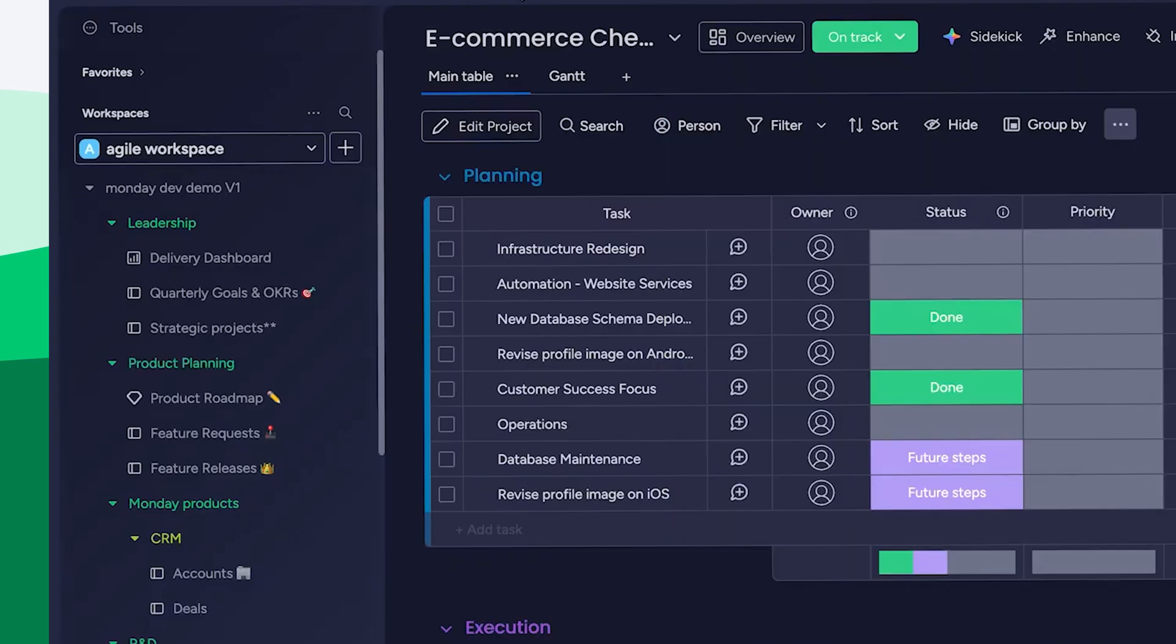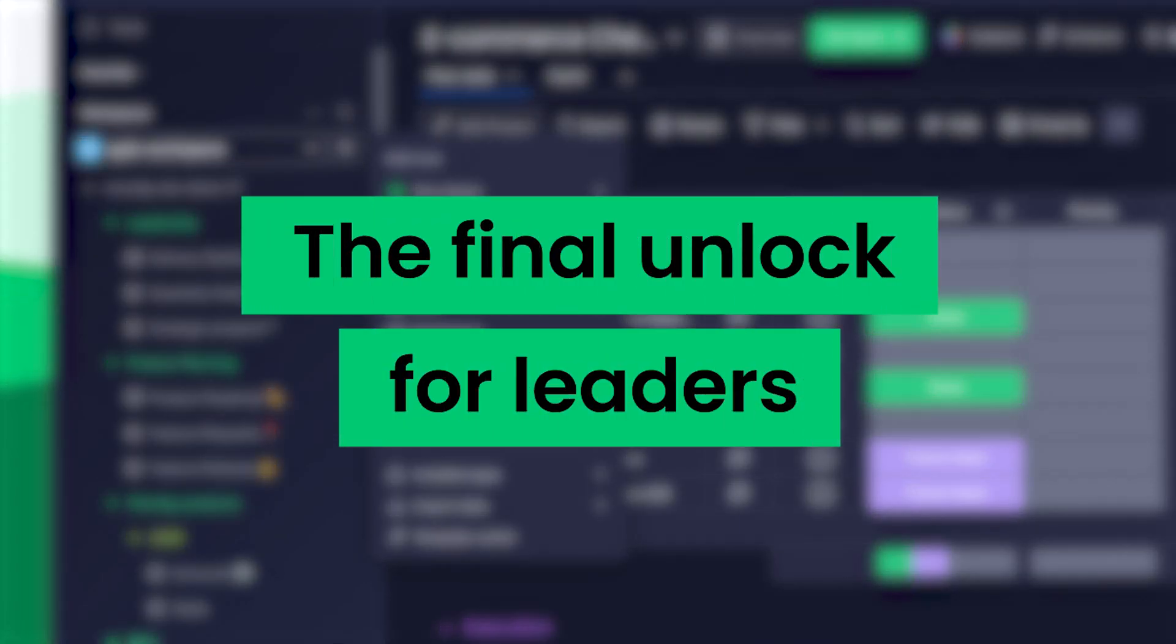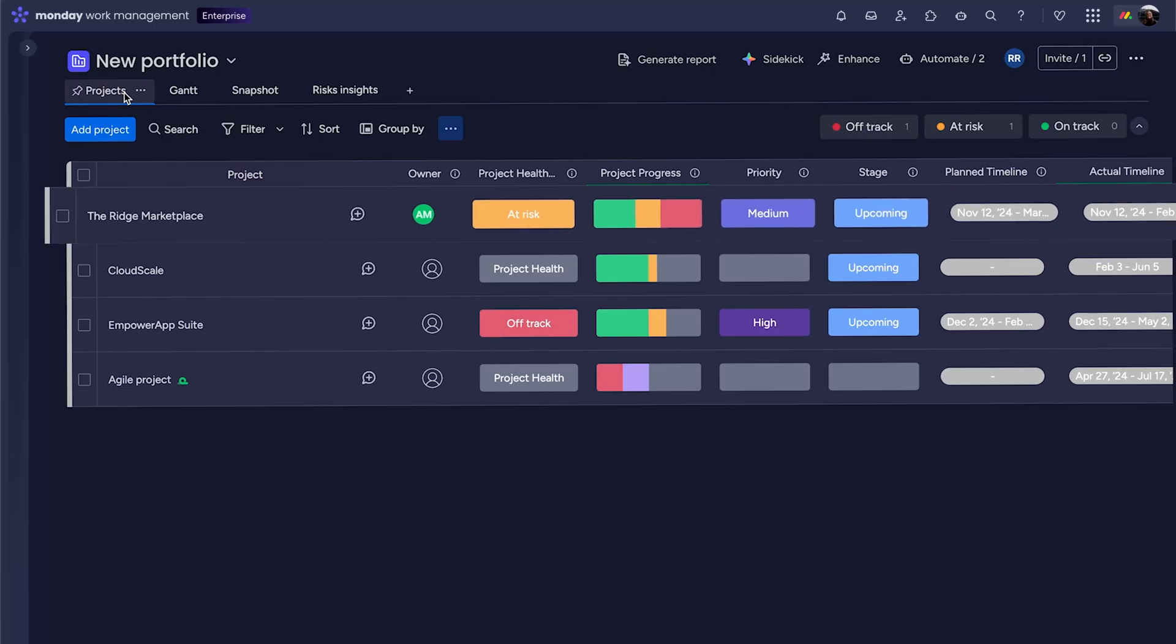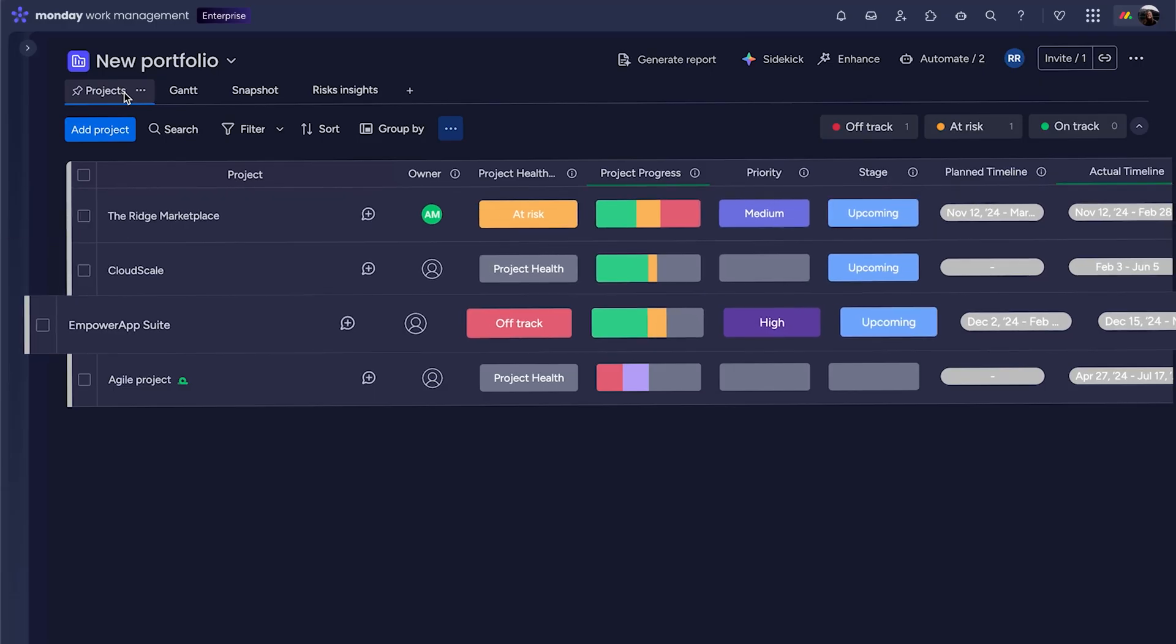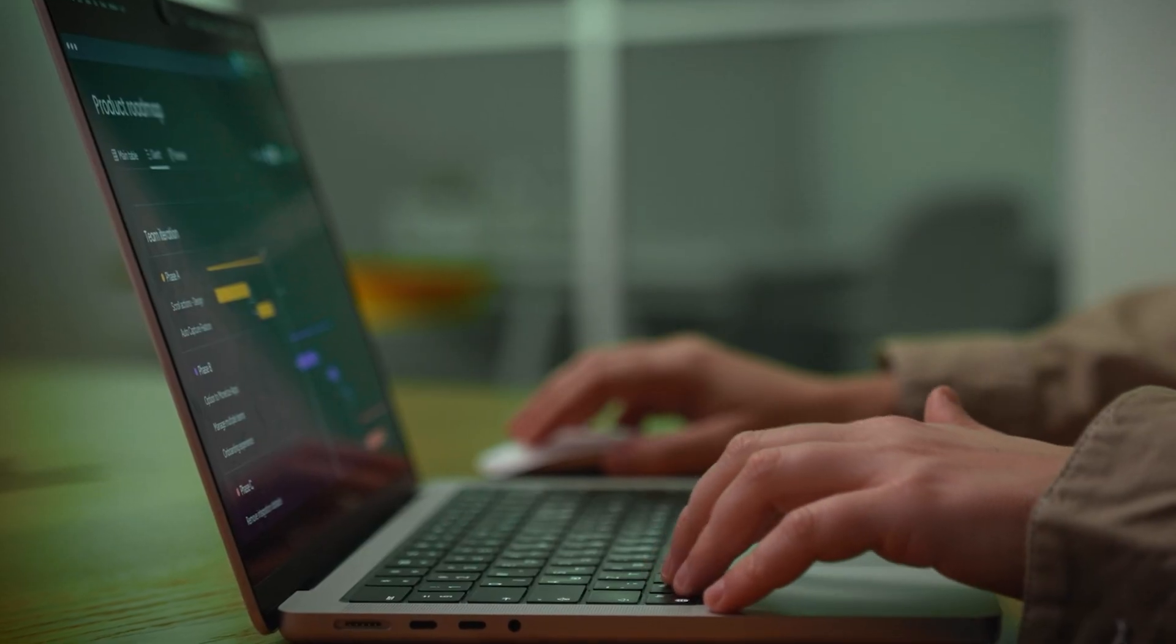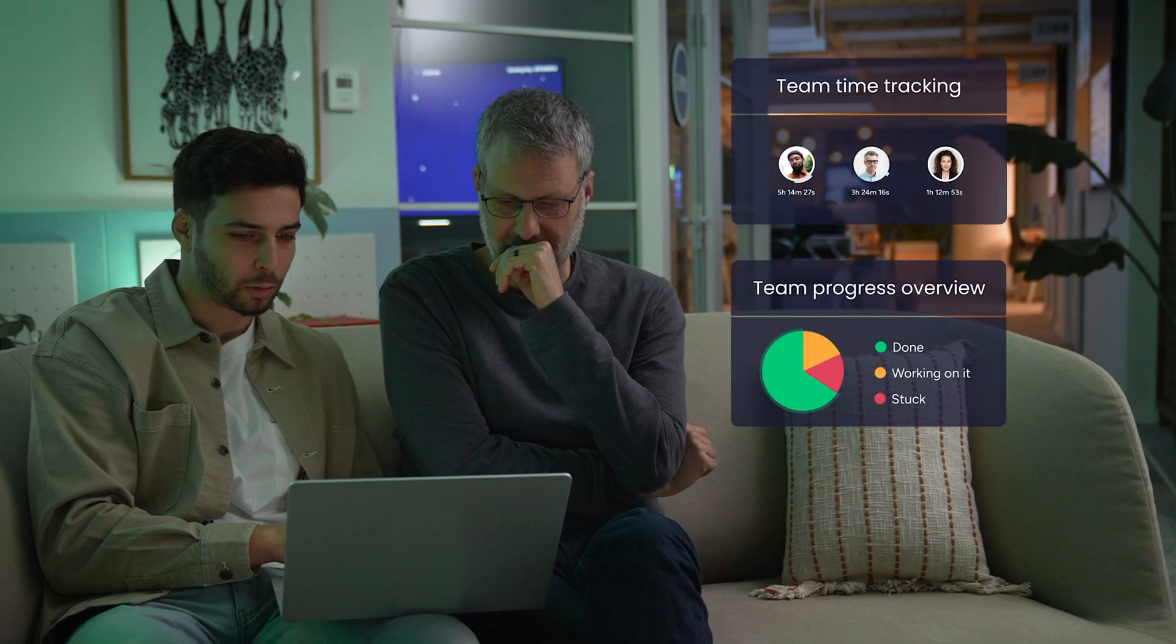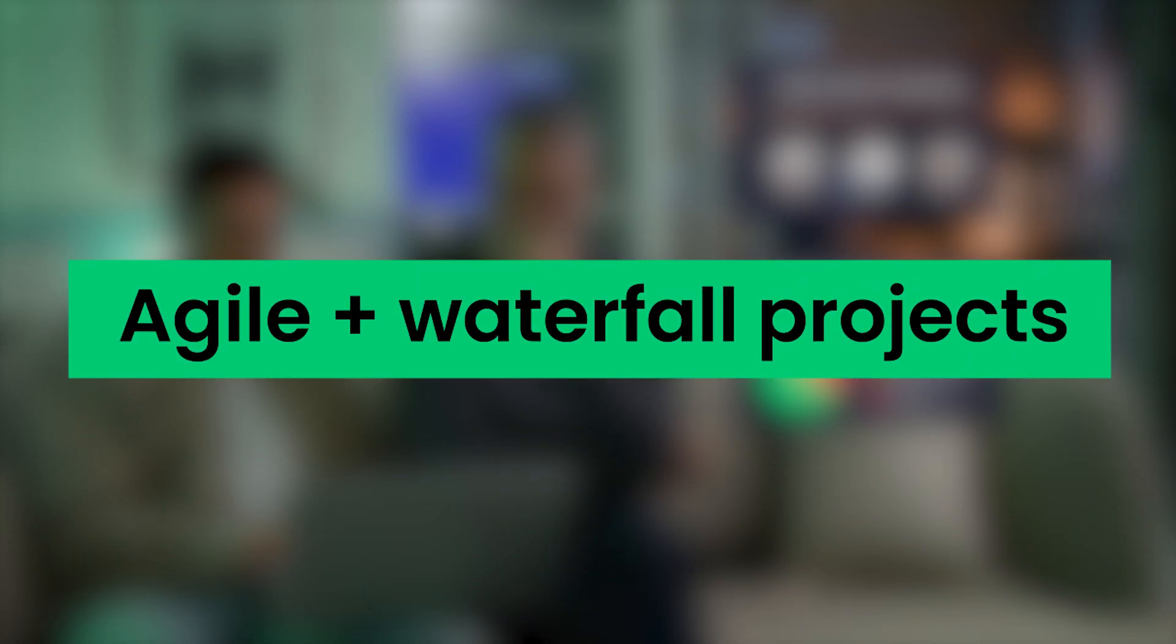For cross-functional planning, there's Hybrid Portfolio, exclusively for enterprise users. It's the final unlock for leaders who need to stay aligned across every team. Agile epics from Monday Dev sink into a shared project view inside Monday Work Management. That means execs and PMOs can track delivery across both Agile and Waterfall projects in one unified portfolio.